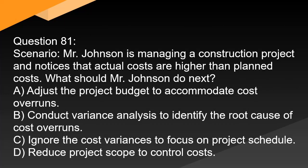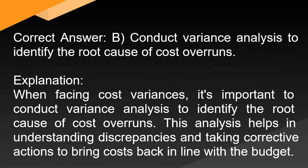Question 81: Mr. Johnson is managing a construction project and notices that actual costs are higher than planned costs. What should Mr. Johnson do next? A. Adjust the project budget to accommodate cost overruns. B. Conduct variance analysis to identify the root cause of cost overruns. C. Ignore the cost variances to focus on project schedule. D. Reduce project scope to control costs. Correct answer: B. Conduct variance analysis to identify the root cause of cost overruns. Explanation: When facing cost variances, it's important to conduct variance analysis to identify the root cause. This analysis helps understand discrepancies and take corrective actions to bring costs back in line with the budget.